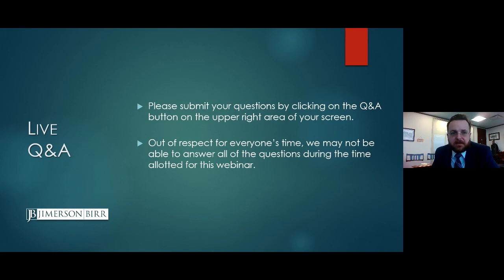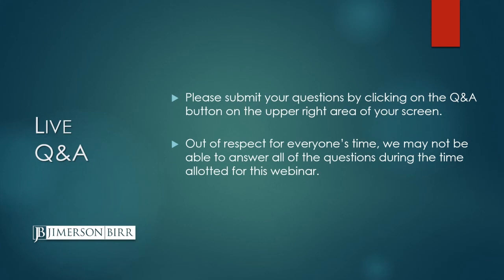We've seen cases where there's millions of dollars at issue and the general contractor had a valid claim, but only provided verbal notice to the owner timely, didn't provide written notice timely, and the general contractor's claim was rejected by the courts. So I caution you to read your contracts, know what your notice requirements are, and follow those to a T.